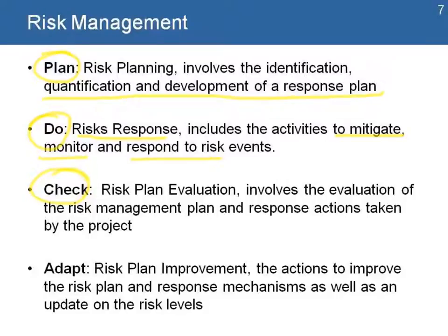During check, we do risk plan evaluation, which is the evaluation of the risk management plan and response actions taken by the project. We basically say how did we do in acting on our plan to manage the risk. And adapt, we look for improvements on our plan, the actions to improve the risk plan and response mechanisms, as well as updates on risk levels.